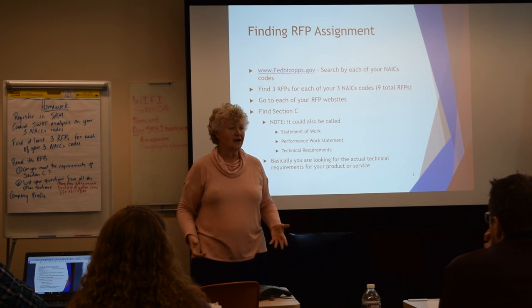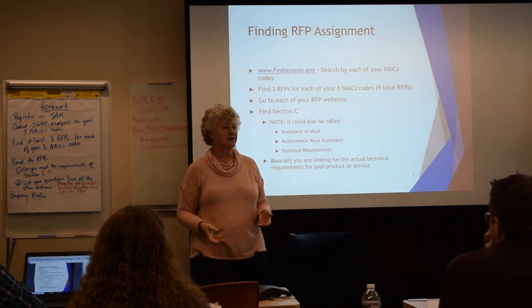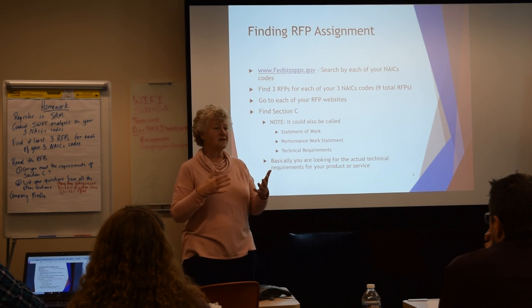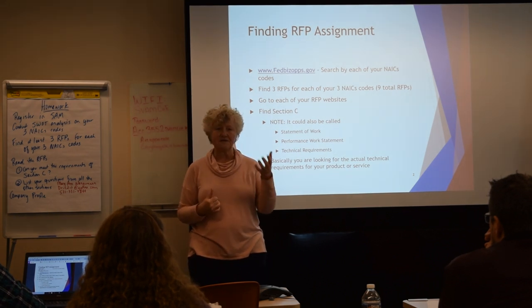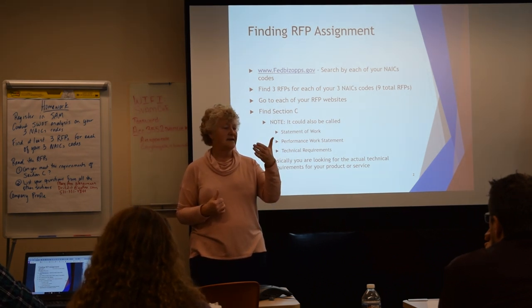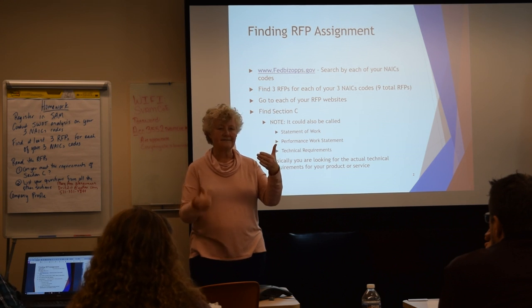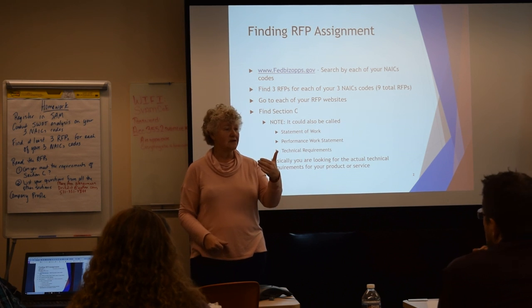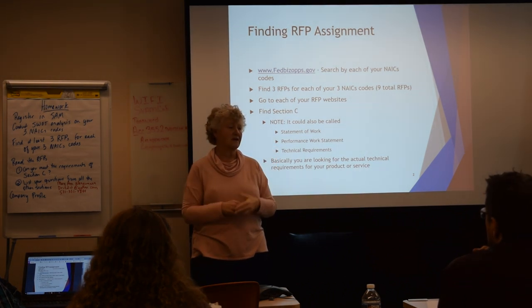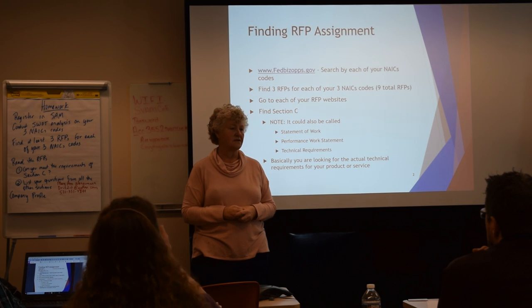So in the contract, you install your lighting solution, and the government comes in, or the contracting officer representative comes in with a light meter, and they test it, and they say 60 lumens. Good. Everything's fine. They come in, and it's 50 lumens, not good. You have to fix the contract to provide 60 lumens.